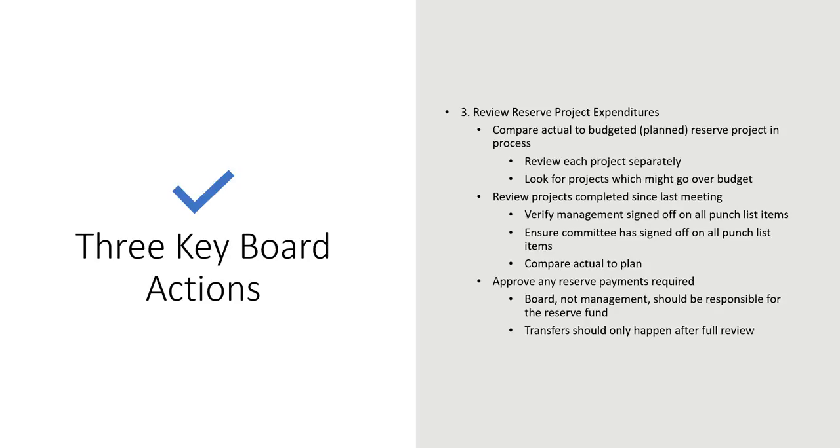Management, construction manager, a board committee if you had one assigned to it. And yes, always compare that final bill, the final total payments, to what you had originally planned. It has two purposes. Number one, just make sure that your planning for reserve projects is working well, but it also gives you the information to give back to your reserve specialist to make sure that the reserve component gets updated for the actual real costs.